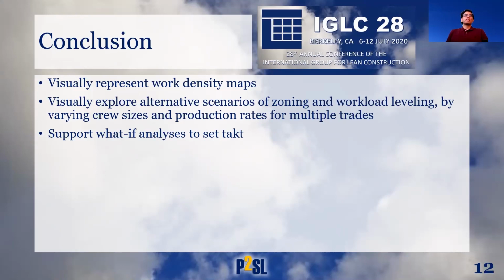The what-if analysis was essential as teams can easily identify, check with different zoning scenarios and see what impact each has on the distribution of work. The zoning and the leveling process was completely data-driven, but could be easily worked on without going through the vast amount of underlying data. Thus, for the project team, it saves time while planning and also increases their efficiency and accuracy.